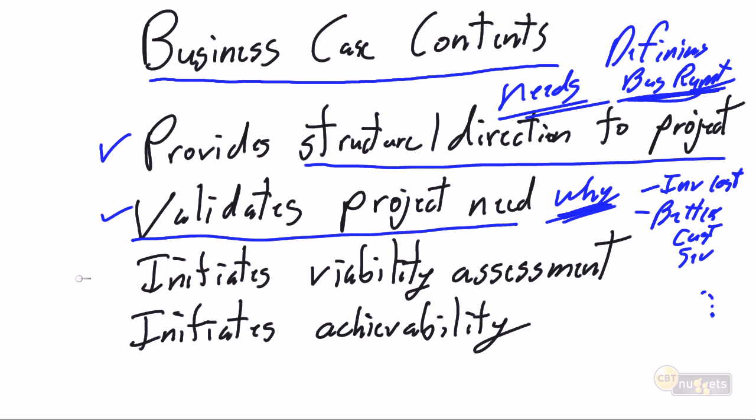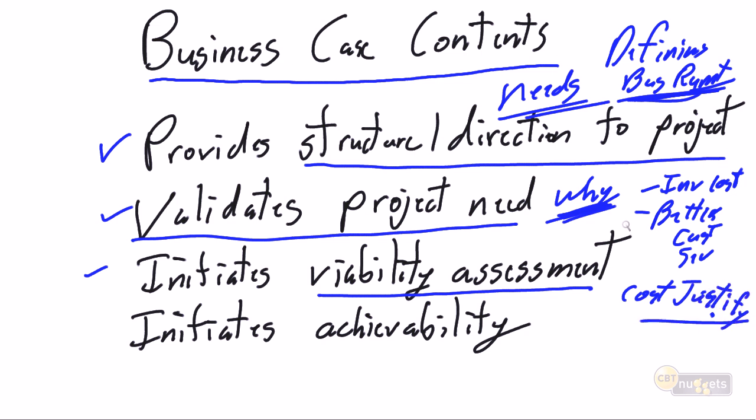And it's going to initiate, and again, recognizing that the business case is going to be an evolving document, we start the business case during initiation, we provide a lot more detail during planning, and we revalidate the business case at the end of every stage. We're going to have the ongoing viability assessment. Is this cost justifiable, basically? Based on these benefits, based on the anticipated cost of $50,000, does this project make sense?